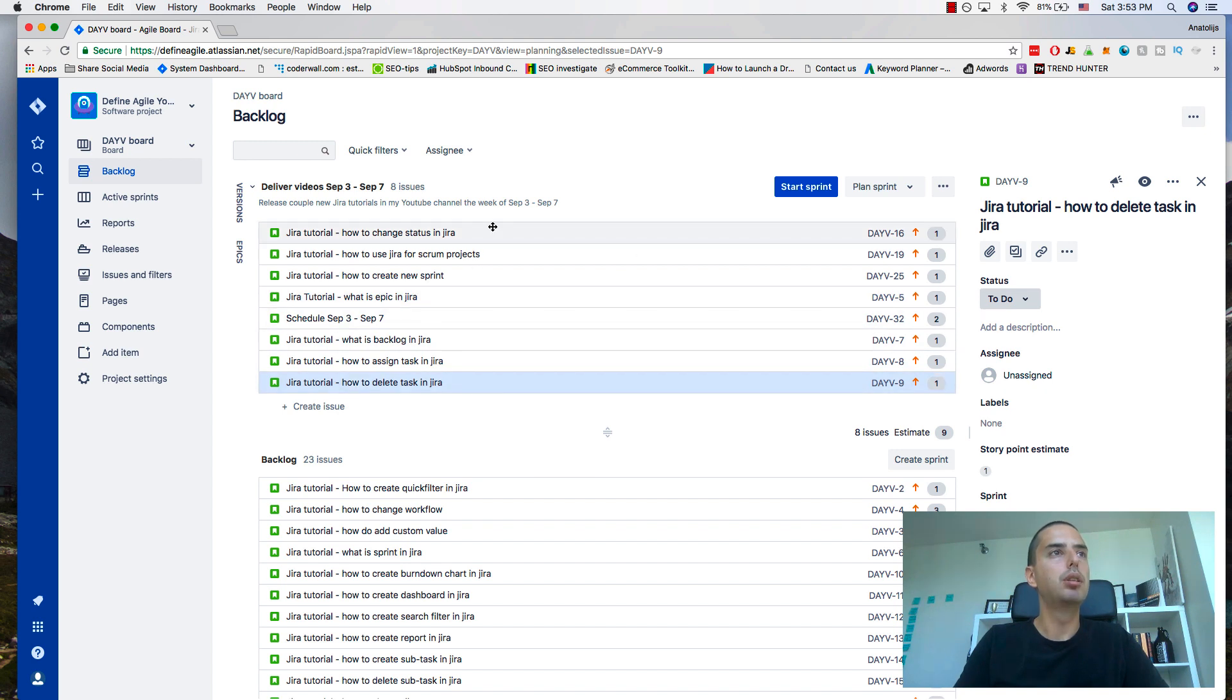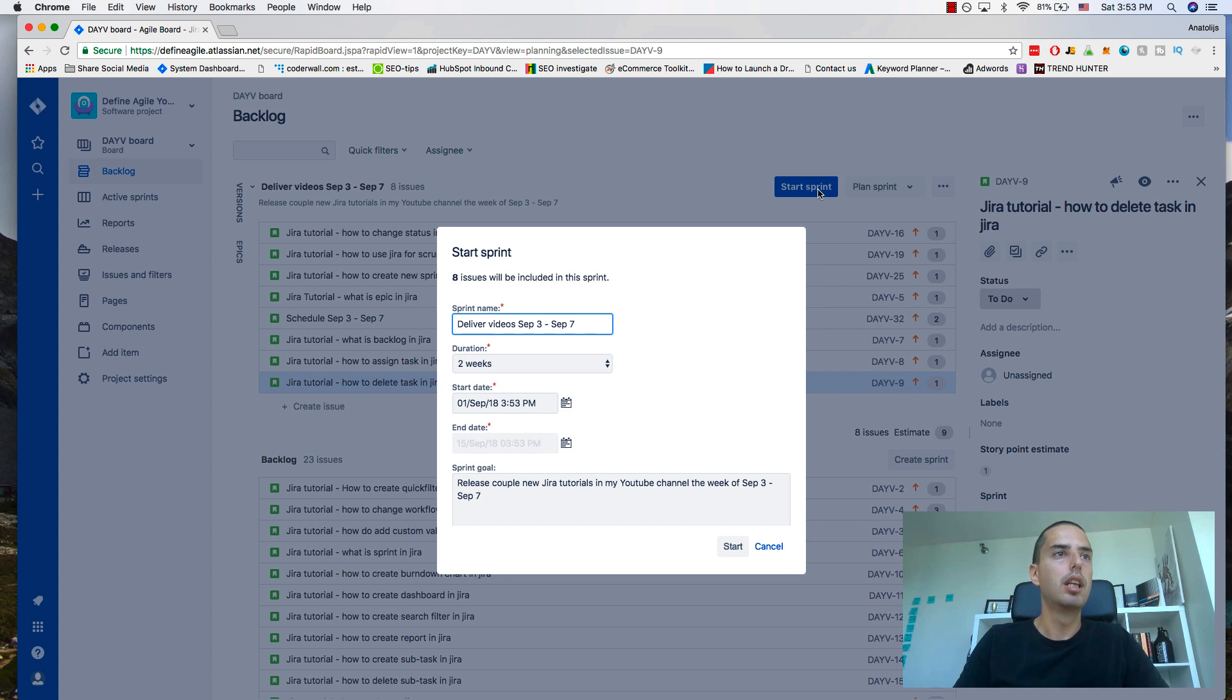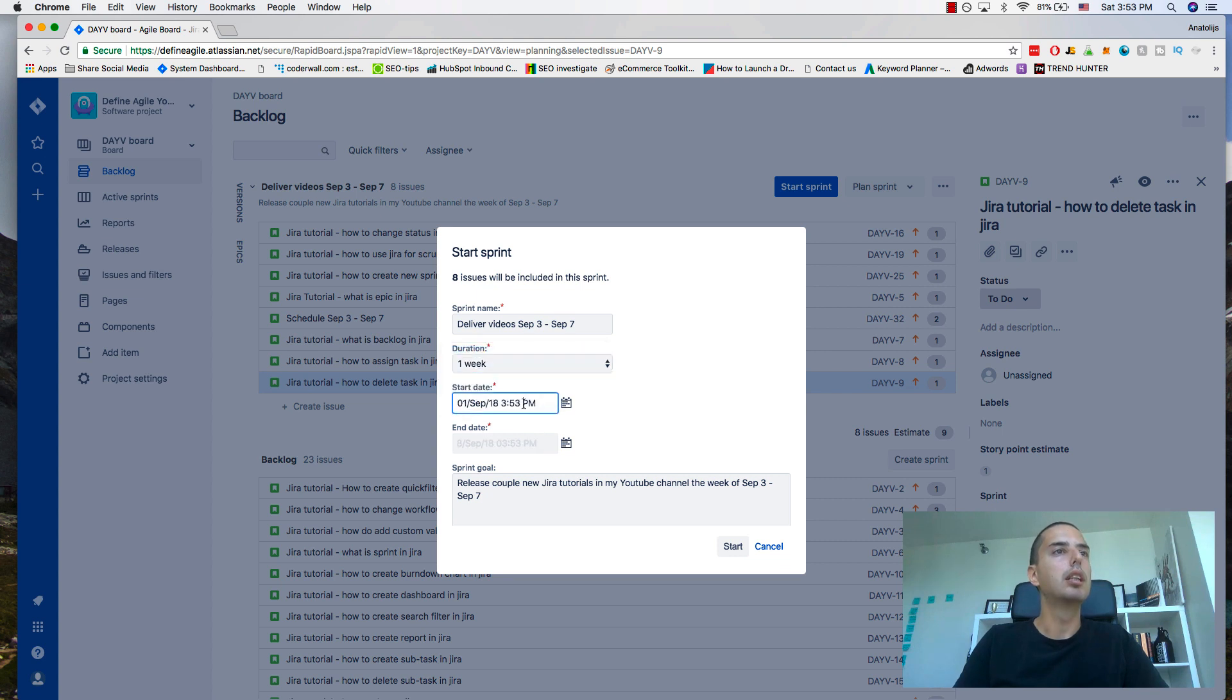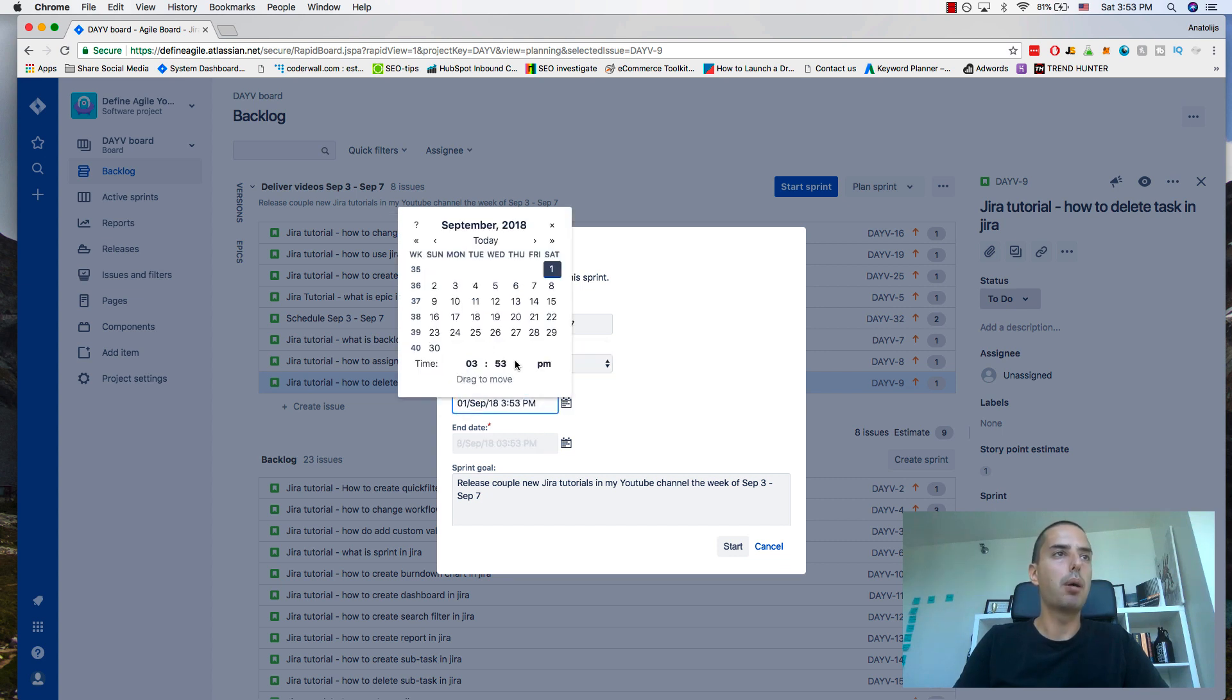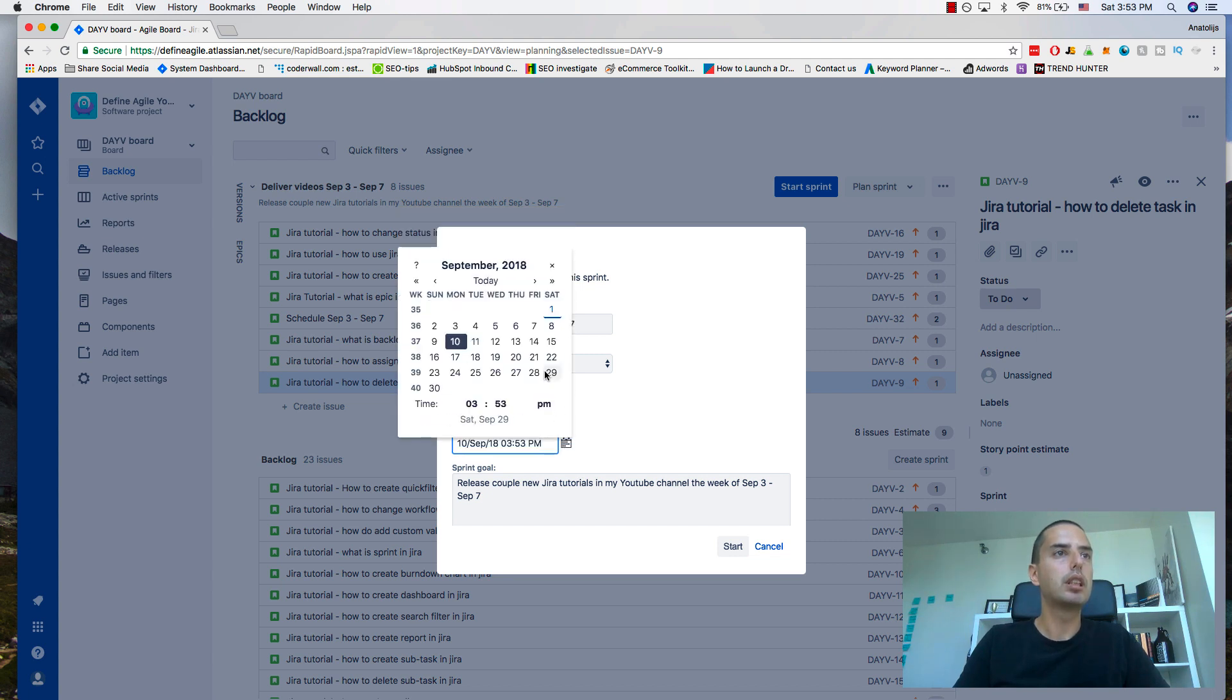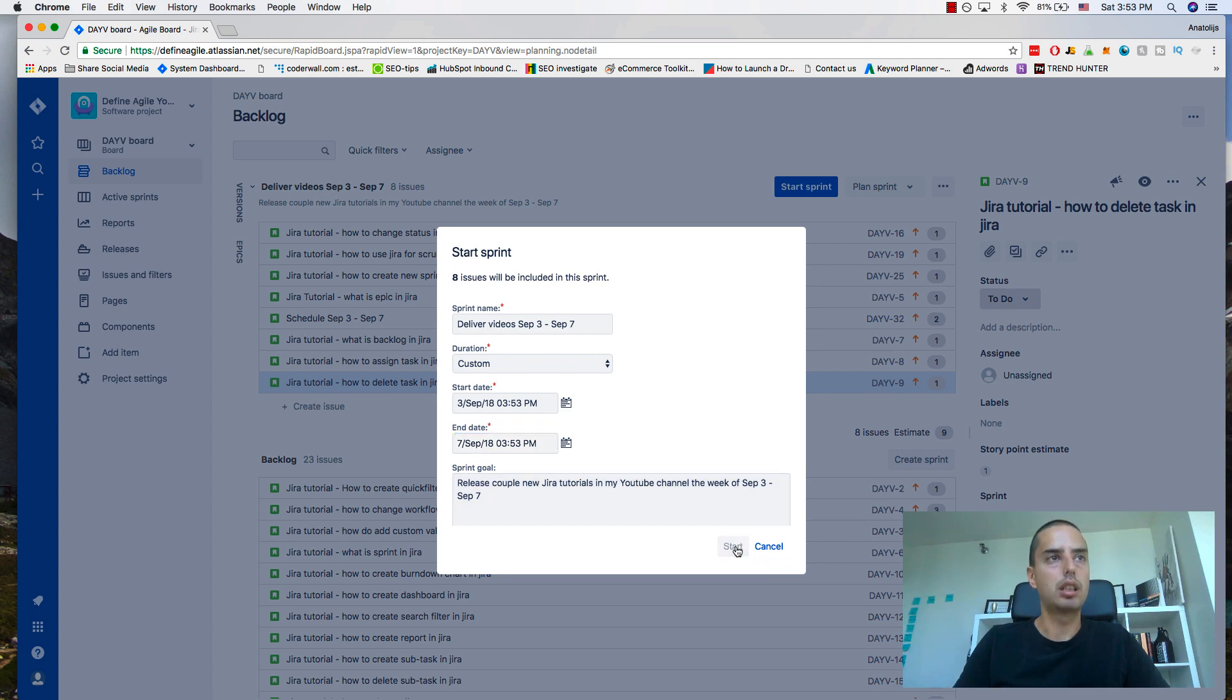When I'm comfortable with this, I click start sprint. Then it gives me a couple of options: the name I already filled in, duration I put one week. It says when do you want to start? I want to start September 3rd and finish September 7th. The sprint goal is already pre-created, so now all I need to do is click start.